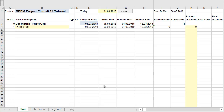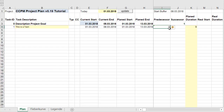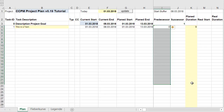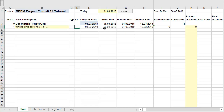This Excel is not unusual. You see an area where you can define tasks, an area where you can define predecessors, and some planning durations. That's the first thing that has to be done — build a project plan. I'll start with a very simple one: the first task is thinking about what to do, which leads to programming in the end.